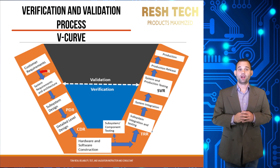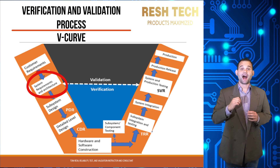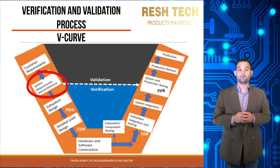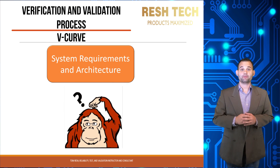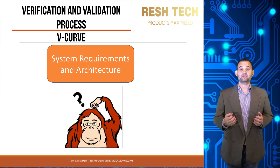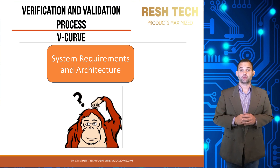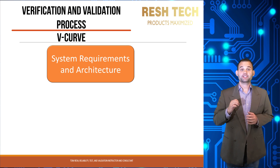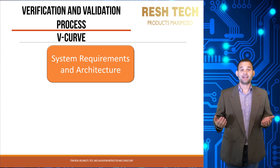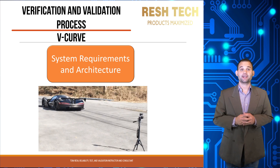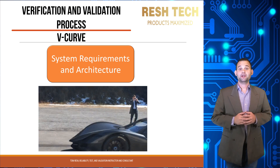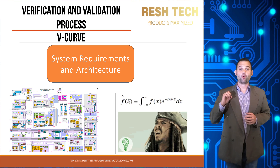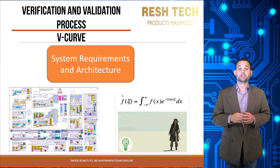The next step is the system requirements. This is where engineering teams come up with a high-level technical solution to meet the customer requirements. Some people think customer requirements and system requirements are different terms for the same deliverables, but this is far from the truth — those terms are not interchangeable. For example, a customer requirement may state that a vehicle must go 0-60 in 3 seconds, but this alone is not sufficient for fabricating a vehicle that achieves it.